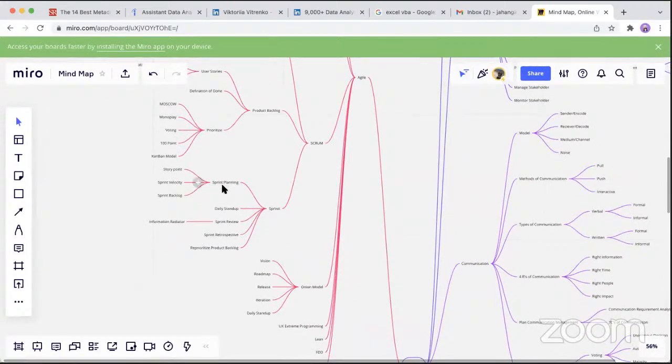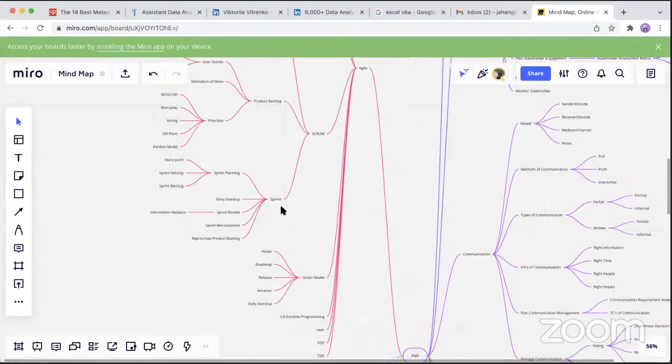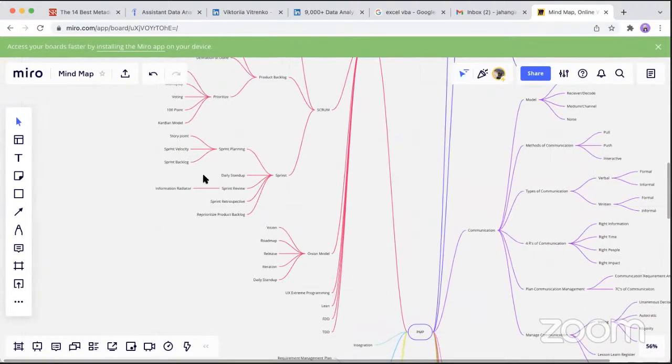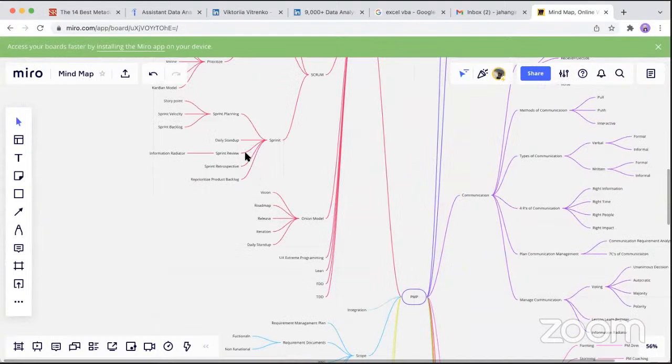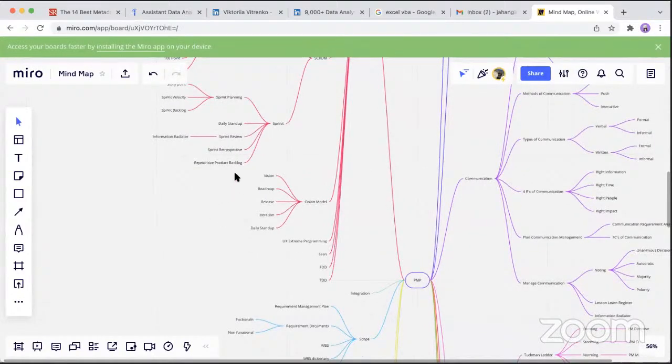In the sprint, when we have a refined backlog, the team determines, based on the product owner's requirements, what is the highest priority. Based on that, we create the sprint planning. In sprint planning, we do estimation with story points, high-level estimation, and based on the story points we complete, we get the team velocity. In the sprint, we do the daily stand-up where we ask three questions: what we did yesterday, what we are going to do today, and what the impediments are. Then after the sprint, we give a demo to the product owner, which is called the sprint review. And then we have the sprint retrospective.